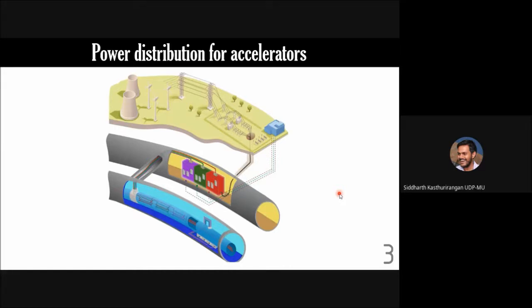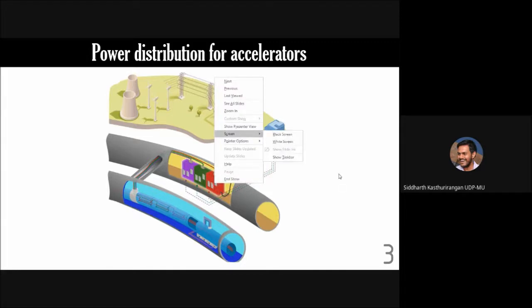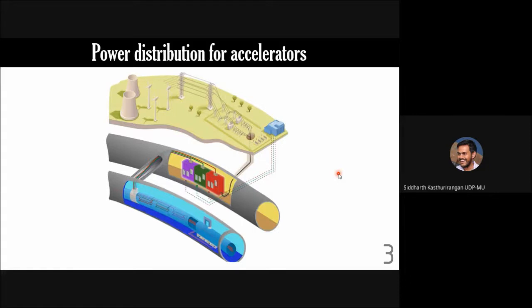Okay. So the power distribution in an accelerator from the grid is itself a broad subject for electrical engineering and the architect to consider how the power distribution will take place. It can be simple things like where do you want the switchboard in the layout, because it should not happen that it is in some region where, when the accelerator is operating, there will be some radiation.